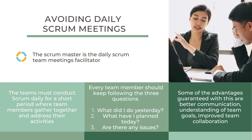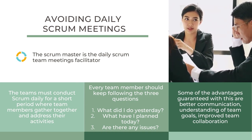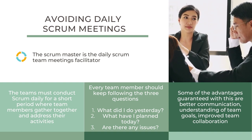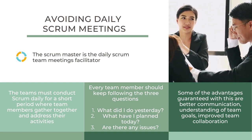Teams must conduct Scrum daily for a short period where members gather and address their activities. Every team member should follow three questions in the daily stand-up: What did I do yesterday? What have I planned today? Are there any issues? These questions look very simple, but team members and managers can understand the flow of tasks and any prevailing issues. The advantages of conducting daily Scrum meetings include better communication, understanding of team goals, improved team collaboration, continuous improvement, continuous integration, and continuous monitoring.